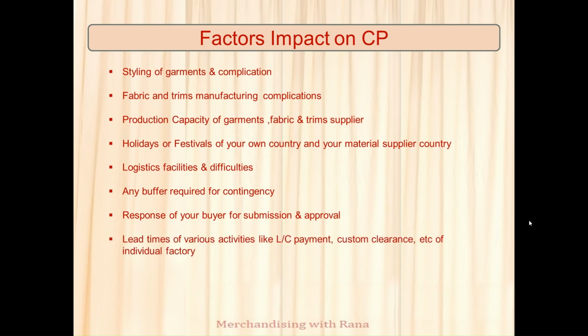Lead times for various activities like LC payment, customs clearance, etc. of the individual factory. See, different factories have some cash problems, so they might delay in providing LC or payment to the material supplier. Customs clearance, you need to see that from Chittagong port or Dhaka airport, how fast your commercial can clear the goods, or whether any port congestion is there. So you need to consider that in CP.